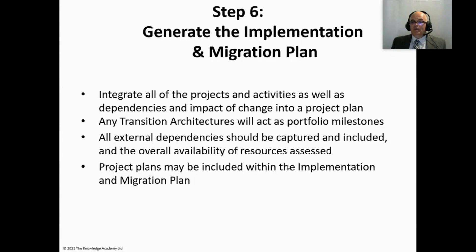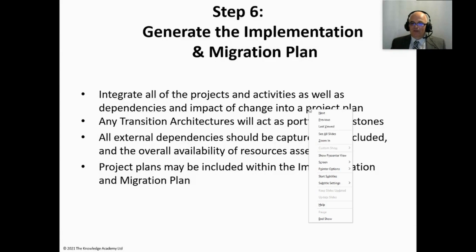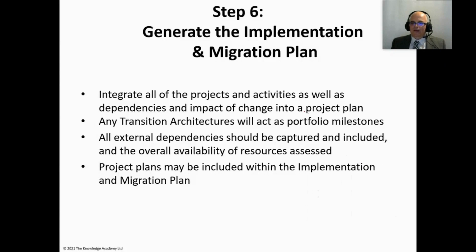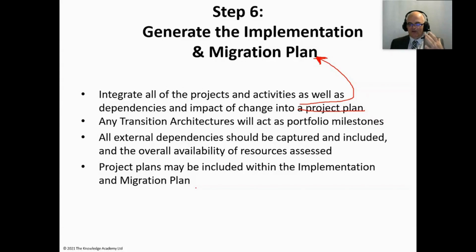Step six: generate the implementation and migration plan. 'Generate' may not be the best word — 'finalize' would be better, since we started creating it in Phase E. The step involves integrating all projects, activities, dependencies, and impacts of change. Rather than calling it a 'project plan', it would be better described as the implementation migration plan, which is quite often a program of works. Transition architectures will access portfolio milestones, and individual project plans may be included within the implementation migration plan.